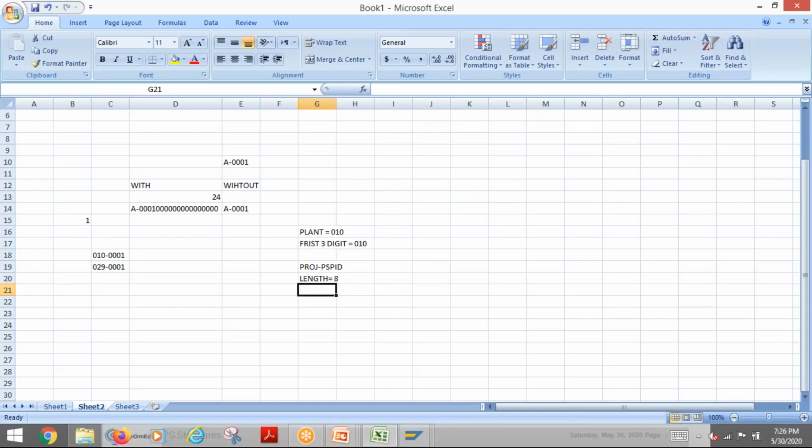So this is not possible through coding mask. With a coding mask you will face issues because, for example, both are starting with 0, the same number, so this is not allowed. That is the problem. The coding mask works only with alphabetic characters. I will suggest that everybody have a look at this OSS note. There is a note which really talks about the coding mask in detail: what is allowed, what is not allowed, and how you can use it.